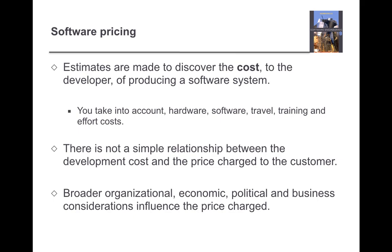Software pricing estimates are made to discover the cost to the developer of producing a software system. You can also consider hardware, software, travel, training, and effort with respect to different aspects involved in the project — all of these have a cost. There is no simple relationship between development cost and the price charged to the customer. Development cost is totally different, and maintenance cost is actually higher than development cost.